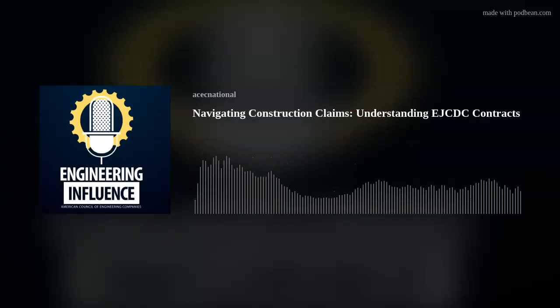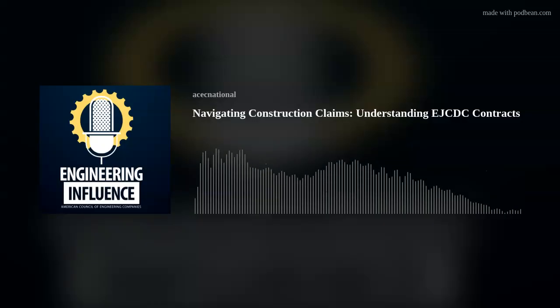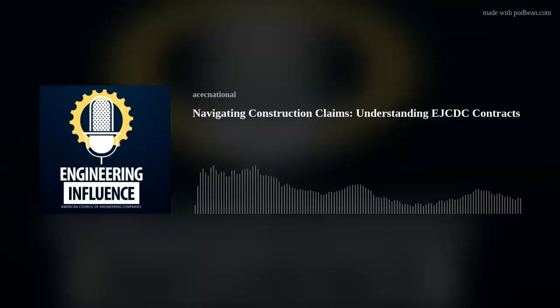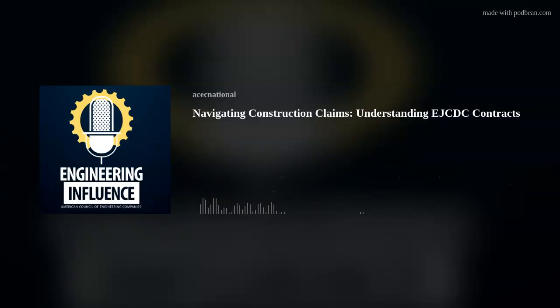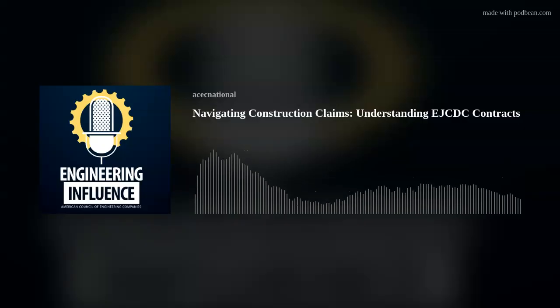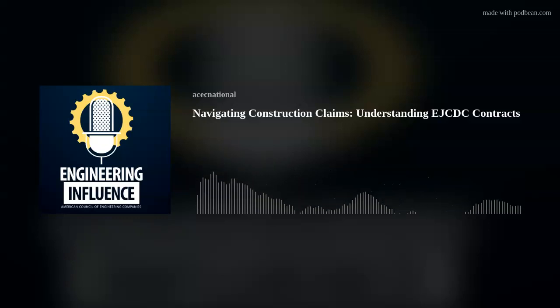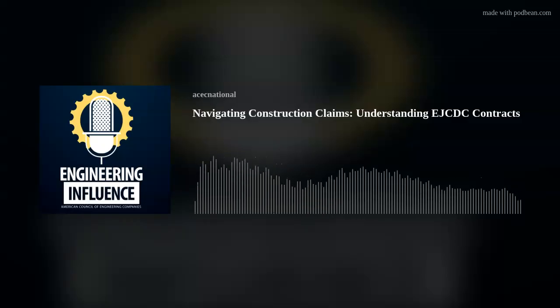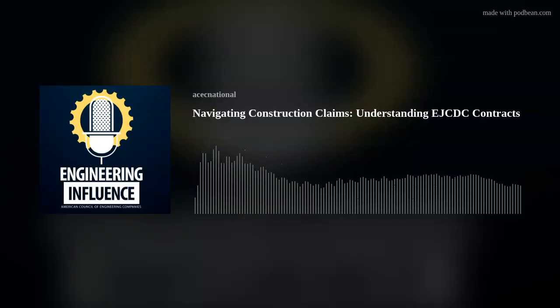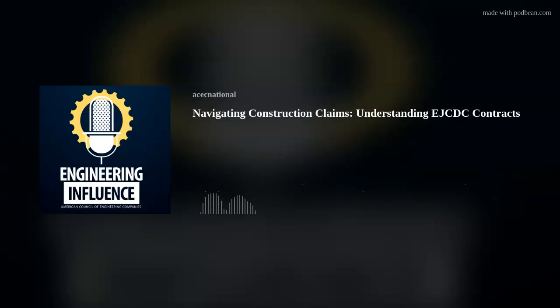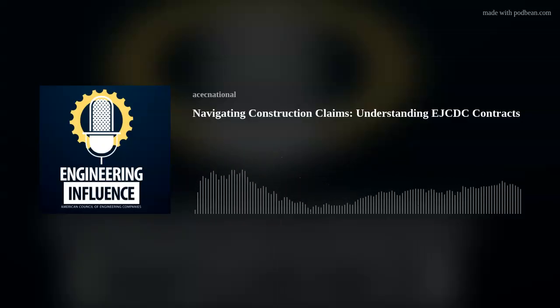reasonable is that? The owner or the engineer might have had 6 months or a year or even more during the design to try to figure out where these are to the best extent they can, and the bidder might have in design-bid-build only a few weeks during the bidding period. So trying to require that the bidder go out and perform extensive investigations of the site during bidding, such as digging test pits or anything, they might be allowed to do that, but EJCDC documents do not require that they do that, under the idea that if the owner and the engineer have superior knowledge of the site, they should do their best, as much as they can, to accurately depict it.